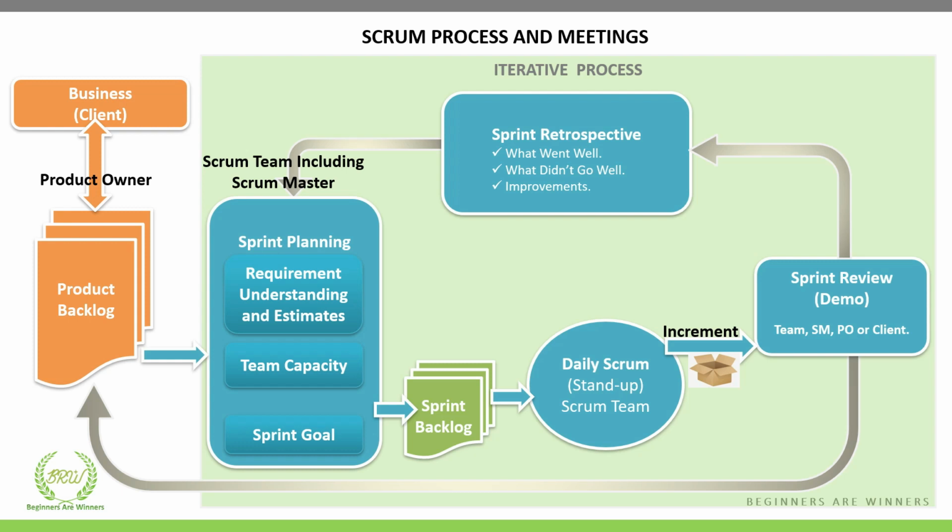As a solution, all those actionable items must be discussed with the product owner to escalate the action points to relevant item owners, and the product owner can create relevant items as per priority in the product backlog, so that they shouldn't be forgotten. The project team, and especially the Scrum Master, must always follow up on those actionable items based on priority to help improve the project deliverables.